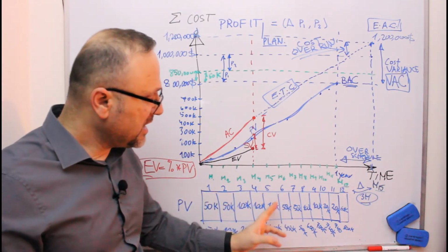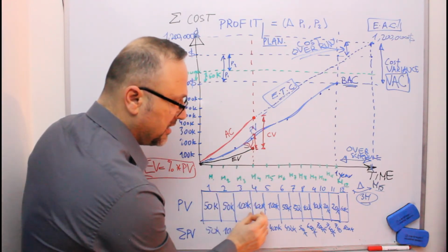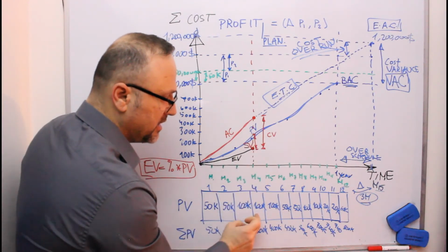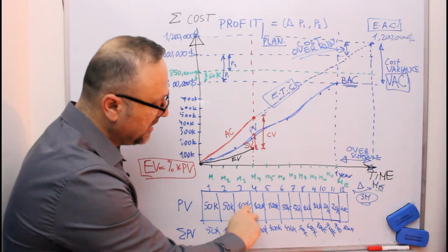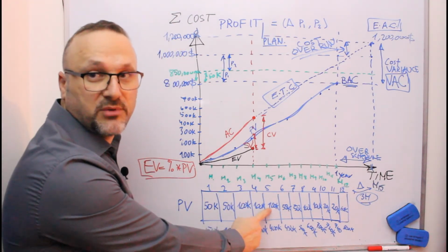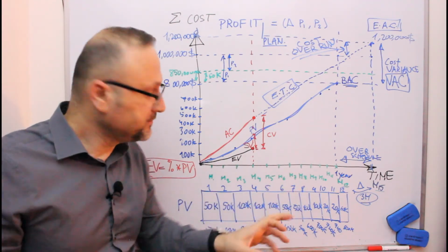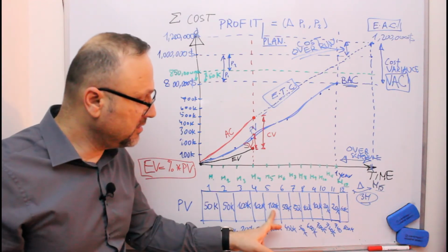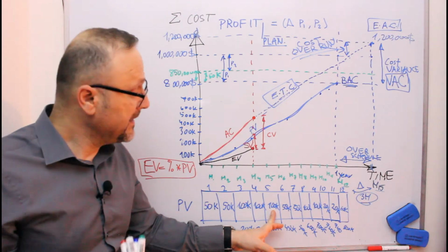So you are planning, and when you are here today, you are actually requesting from the company and telling them, okay, today I need 100,000 and for the next month, prepare for me another 100,000. So the company will prepare in their cash flow the 100,000 to be ready. They check and make the money available for you for this project.